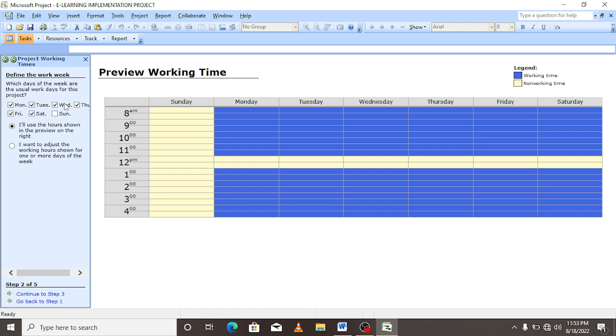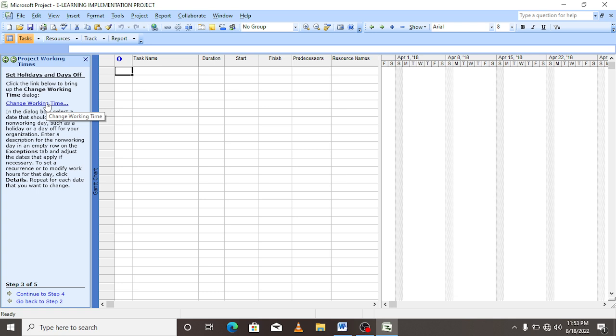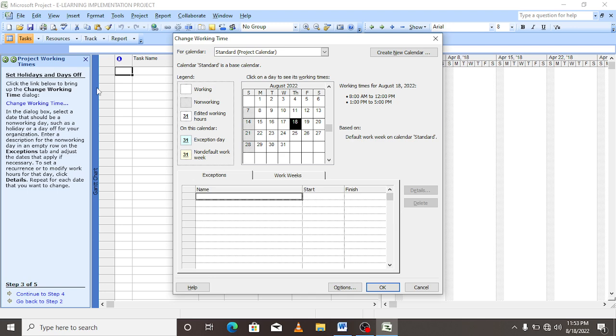Set holidays and days off. Here they can say make this month a holiday, or they can give you a date and say make 4th May a working holiday. Then you just come here, change working time, and look for that month. You click on it, and then you change it. Okay, hope that is clear.